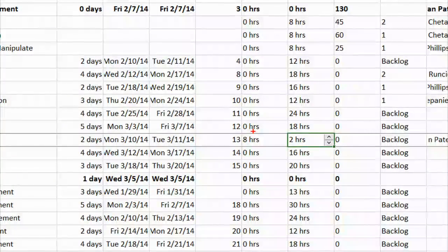And the idea is that whether we need all the details or we roll those hours up into a higher level task or what we call a feature, or if it's a story point, or excuse me, a user story, we can roll that information out of TFS, bring that to Project, and maintain that continuity of motion that says we can still see that schedule, actuals and remaining coming in. Whether they went to Project or Project Server or if they didn't do either, they can still stay in this environment. And we allow them that flexibility to continue to give us feedback ongoing while they're using the native tool that they have. Yes, go ahead.